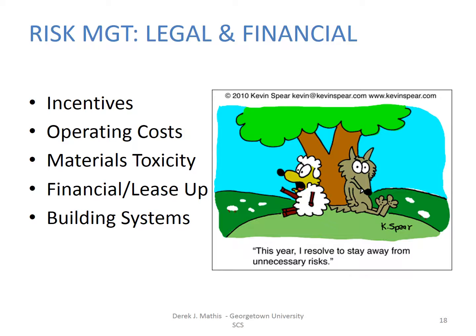The solution to that is rather difficult to mitigate because you simply can't predict your costs without knowing the energy required. Potential overruns can be addressed via the tenant leases relative to who handles the OPEX. In a full service lease situation, the landlord pays the tenant OPEX, and they can mitigate this through expense stops.